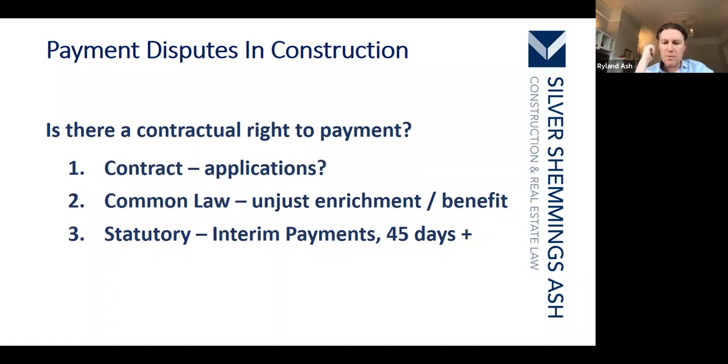So what the courts have done is they've tried to apply the existing law to the new statute. So what they say is, well, you can only make an interim application. You can only get paid an interim sum on the dates that you've agreed. And if those dates are agreed, then they will apply. If those dates run out, for example, as in a recent case involving Balfour Beatty, if you've got a schedule of dates and they expire, you're not entitled to any further interim payments.